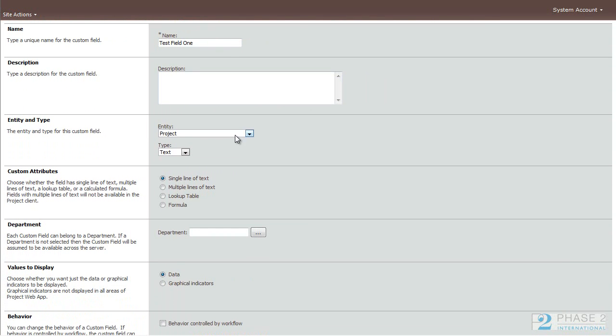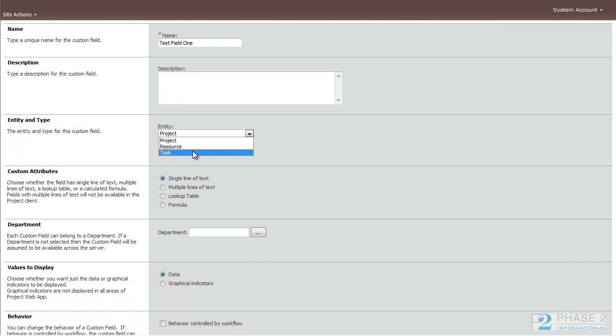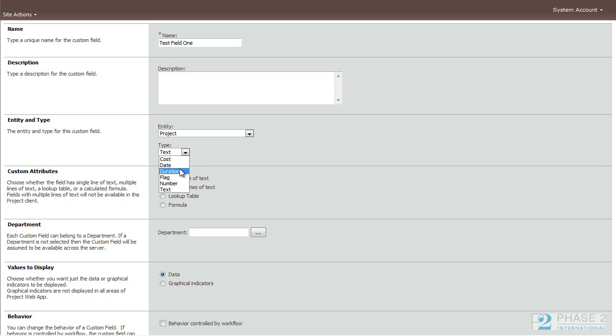Next, you want to choose an entity and a type. You have three different entities: project, resource, or task. And the type of field it will be. You have six to choose from: Cost, date, duration, flag, number, and text.